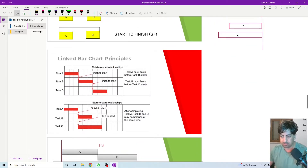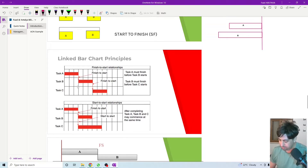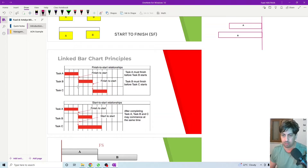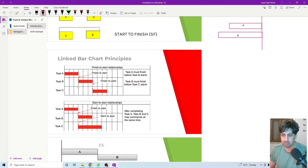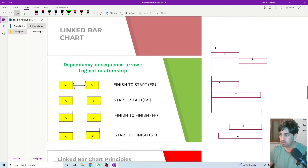Let's look at an example with a Gantt chart. I have activity A, activity B, and activity C. If each column represents one day, then what is the type of relationship between A and B? Activity A starts here and finishes here, then B will start — so it is finish-to-start. As soon as activity A finishes, activity B starts. Similarly, activity B and activity C also have a finish-to-start relationship.